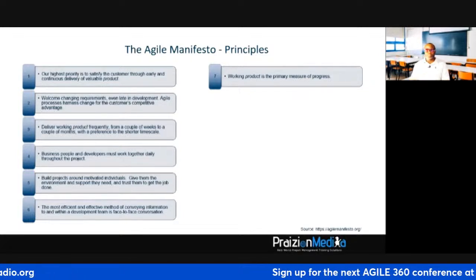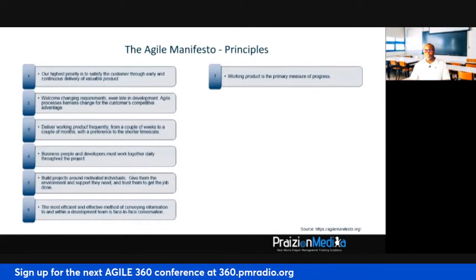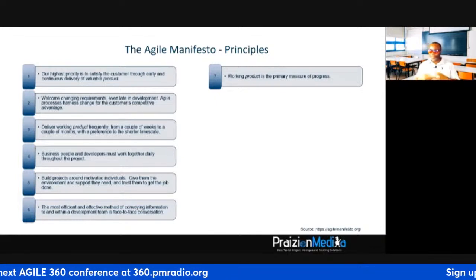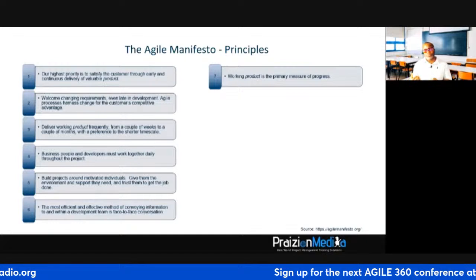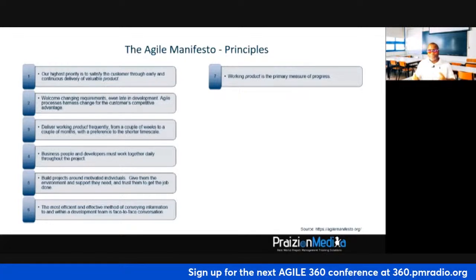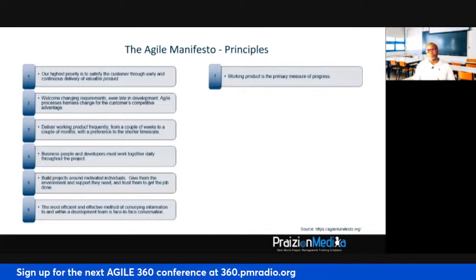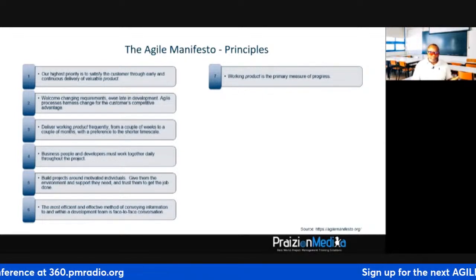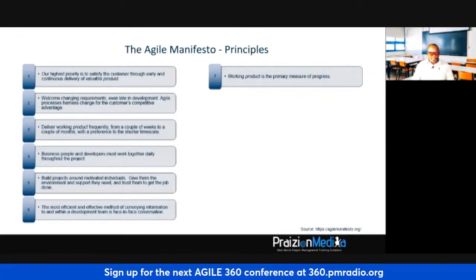Besides, the way it works in a lot of Agile shops these days is as you're working, there's a software application that is keeping record of how many things you're doing, when you started, when you finished. So if anyone really wants to know an overall idea, they can go into the system and look. But it's not % completes. It'll just show you things like completed versus committed. How many did you commit to? 50. How many are complete right now? This amount. That kind of thing.